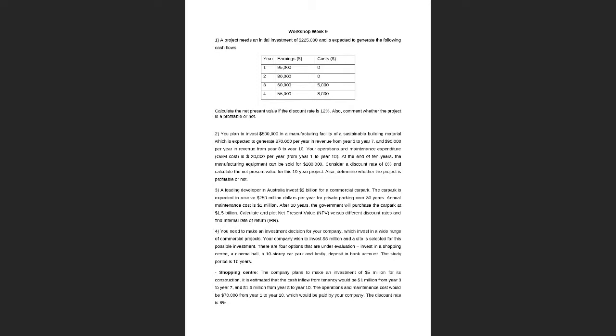Okay, you can try. Try to take a discount rate maybe from 10% to 20%, maybe try between that range. You can try 10%, 15%, 20%, and see if the net present value is transforming from negative to positive, or positive to negative. Okay.